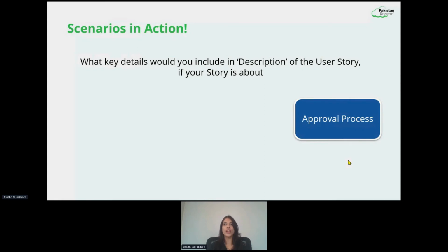And who are going to be our approvers? Is it single level approval? Do we have multi-level approvals? Do we have an SLA for this approval? Do we need to trigger an auto approval if, after so many days, nobody approves it or actions on it? Do we need to have delegates for approval if somebody is out of office or things like that? Do we have to take care of the rejection process if an approval comes? And like I said, as we groom these and as we capture different elements for our questions, they might potentially become your different user stories for the same process.